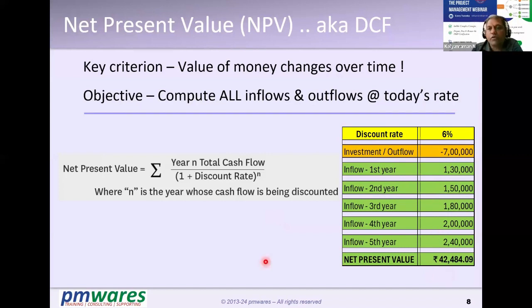Now, by putting these inflows like this, you can always compare your performances, actual versus planned also, around those periods or across the phases. Now, I put it in a year. The other way to do it is also in your waterfall methodology. You could build phases, or in your agile models, based upon your iterations, releases, you can factor this. No problem. This model works across all those scenarios.